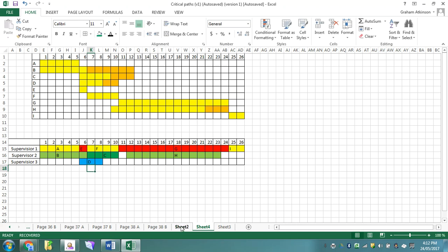So the smallest number of supervisors I can have is 3. It would be nice if I could have squeezed these bits together and therefore fitted it all into 2, but actually that's not feasible because I can't do anything but have I at the end, and everything has to finish by the end of week 24 to enable I to finish by end of week 26.